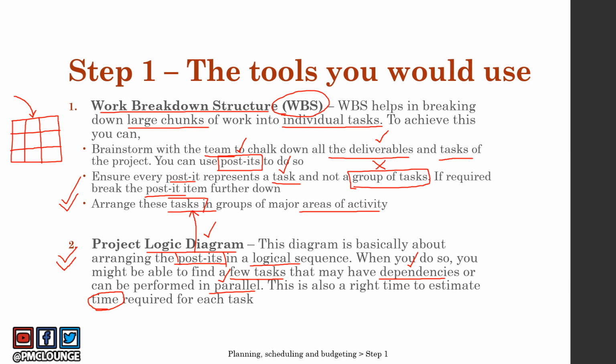Dependent tasks are activities that are dependent on other activities. For example, it is not a good idea to start building a bridge before you have designed it, right? So you need the design task to be complete before you can start building that bridge. Every task related to design, the entire design activity, should be complete before you can start the tasks related to actual construction.